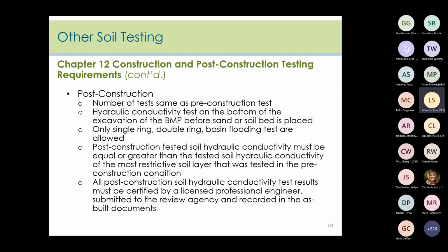The permitted test methods for post-construction testing are as follows. Only the single ring infiltration test, the basin flooding test, and the double ring infiltration test, or a similar test that does not require a test hole in the soil layer, are allowed.